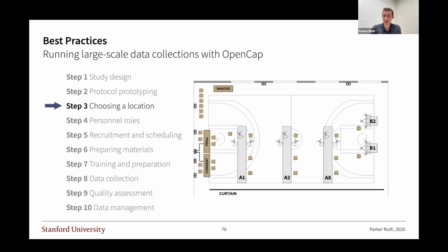It was also helpful for us to have multiple stations so that if there were any technical difficulties and we had to recalibrate a setup, we could just switch over to another working station without falling behind schedule with our flow of participants. So just seeing the layout is helpful for planning where people are going to go and how much space you need. Also, because these stations are now pretty far away from the power outlets, we knew we wouldn't be able to stretch charging cables without creating tripping hazards. So we put portable battery packs at these stations to keep everything charged.